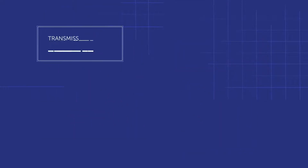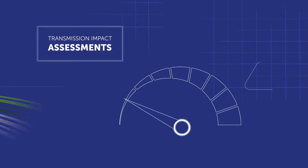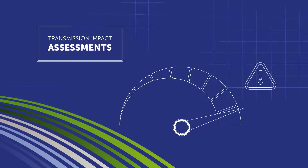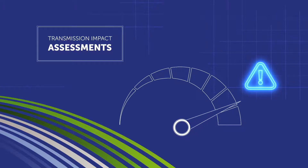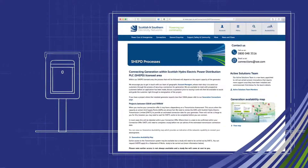Your connection offer may include a dependency on a transmission assessment. This occurs when the capacity at certain grid supply points cannot accommodate your connection capacity. Where this occurs, an application to Scottish Hydroelectric Transmission Limited is required. Your account manager will discuss with you whether statement of works, modification to the application, and or securities and liabilities may be applicable.